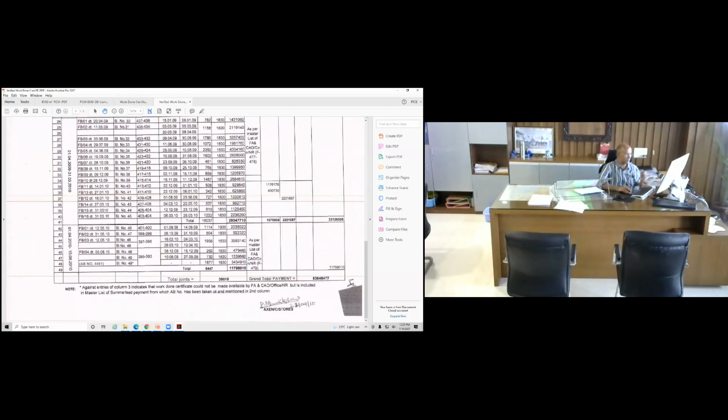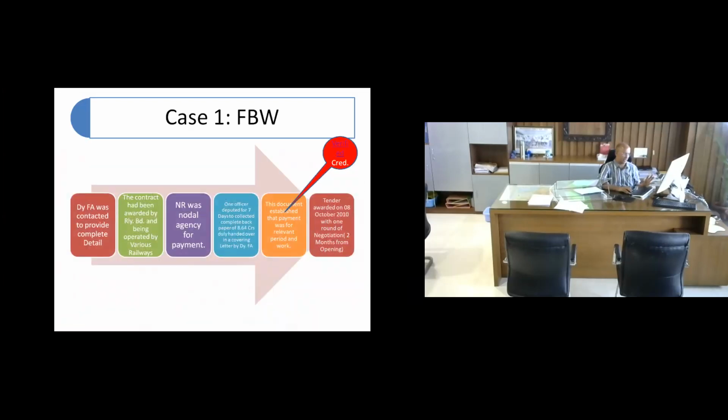And our requirement was something like 8.1. So the lowest tenderer's work credentials were verified like this. So two hurdles were there. First was the EMD issue. Second was the work done credential. And finally, since there was a precedence that the same firm had quoted less rate, we called him for negotiation, but he did not reduce the rate, saying that market conditions have changed and we will not be able to reduce much. Of course, a notional reduction of rate was done and the tender was finalized.